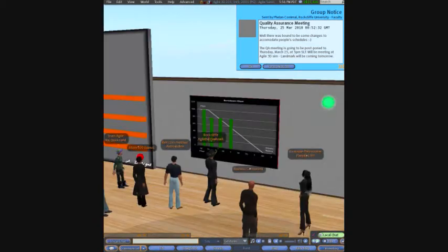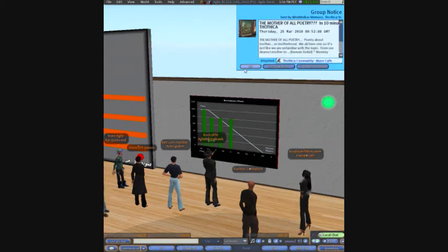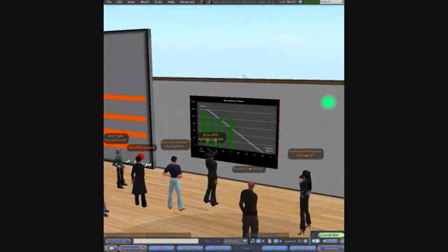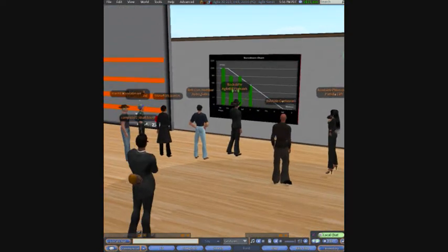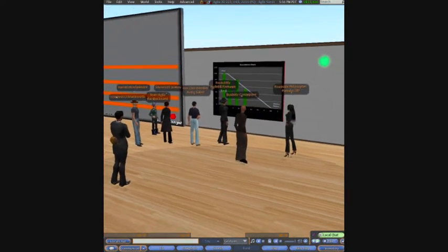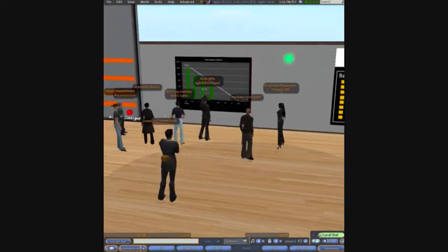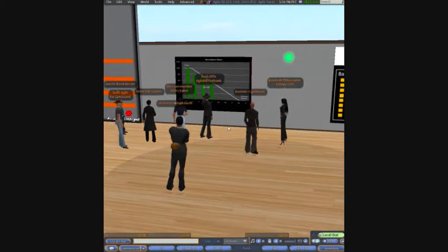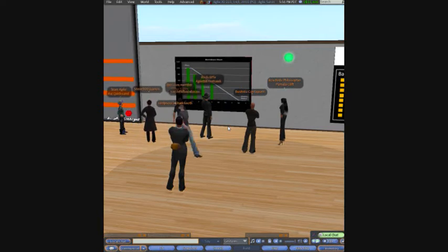Just to answer your question, I would say that this particular project, while not necessarily in trouble, certainly is worthy of some attention and some questions as to why more isn't getting done on this. Exactly. We're flatlining. We're in trouble a little bit because the rate of progress needs to be down like this. We need to be meeting the slope of that curve because that curve is showing a gradual decrease in the amount of work left. That's how we read the burn down chart.